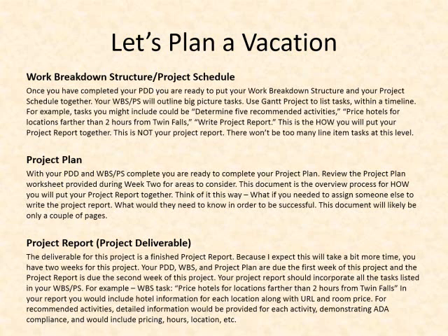That's the line item, or one of the line items. Once you have your work breakdown structure and your project schedule in place, and if you have more than one person on your team, your project schedule would include who's responsible for what details, and the timeline would also be included. Remember that Gantt project doesn't let us get less than a day for a project, so you'll have to assign a day at least to get things done.